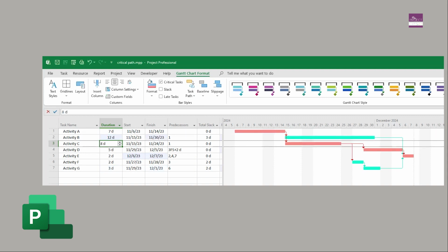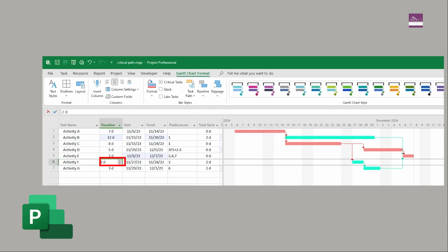Now, one thing I wanted to point out that I didn't do before was that the total slack here, how it is for task G had 2, but also task F. This is because it goes backwards to where whatever that first one is, and it'll keep calculating backwards, that whole path has 2 days of slack. So maybe it's this one that adds the 2 days. Either which way, you can add it to either task, and that gets it onto the critical path.